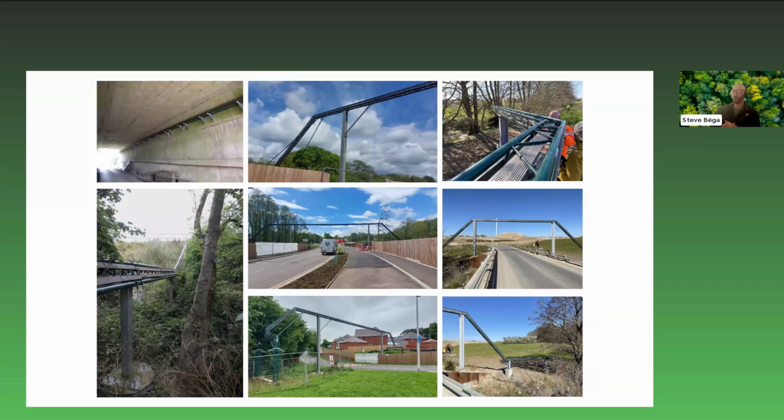We've managed, as I said, to turn around projects within a 4-week turnaround from when the design has been approved and completed. Although depending on material availability and design complexity, obviously this can vary. These types of bridges are not typically stock items, although we do personally carry a small inventory, particularly for this dormouse design I'm showing here.